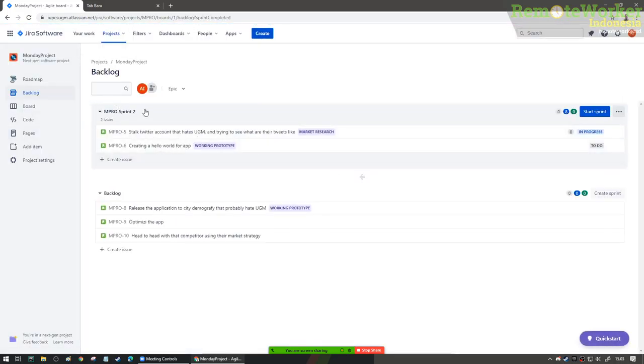Now, this means our performance is bad, because there are tasks from the last sprint being carried into this sprint. We are working in a slow manner. This is the idea of Scrum. This means we need more resources. Why? Because there are two tasks here that are being carried over from the previous sprint. This is really bad for us. Say, okay, we put in another team.